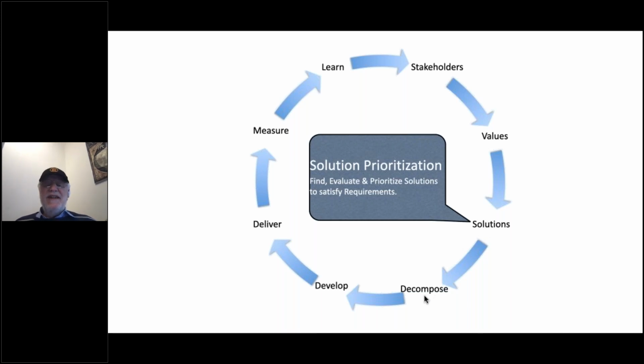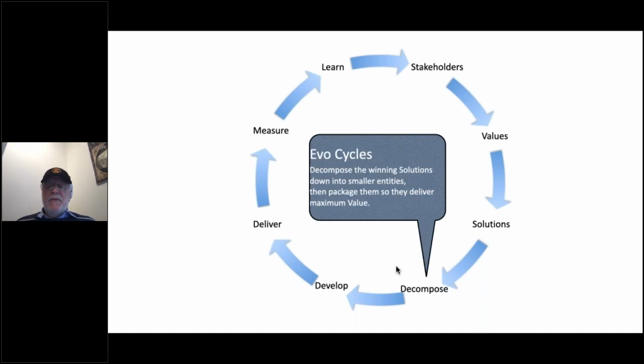But we're also going to talk about decomposing the solutions, which are often big architectural ideas that would take a year or 2 or 3 to implement, into very much smaller ideas. Some of you might like to think about them as sprints, but I call them value delivery steps. And I like to think that they're about a week, maximum a month, maybe 2% of the budget, something like that. So decomposition is something we do so we can do Agile properly step by step and deliver critical things early. We'll talk more about that. So the main part of the talk will be here today.